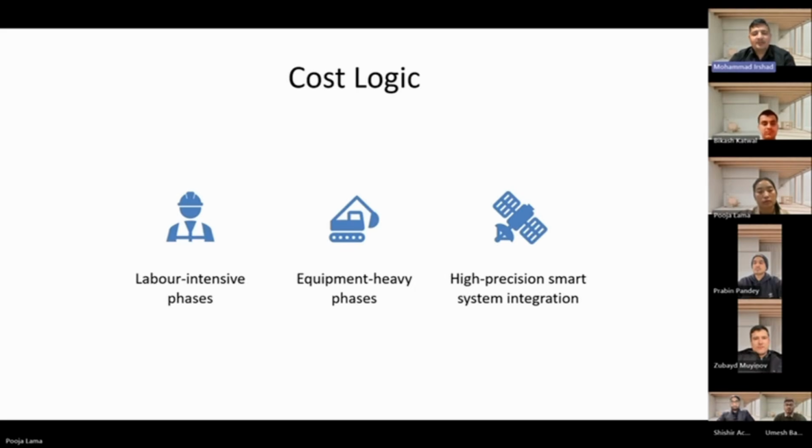This spending pattern reflects our risk analysis from the risk management plan. We invest more in the tasks with higher RPN scores to protect the schedule and avoid costly rework.